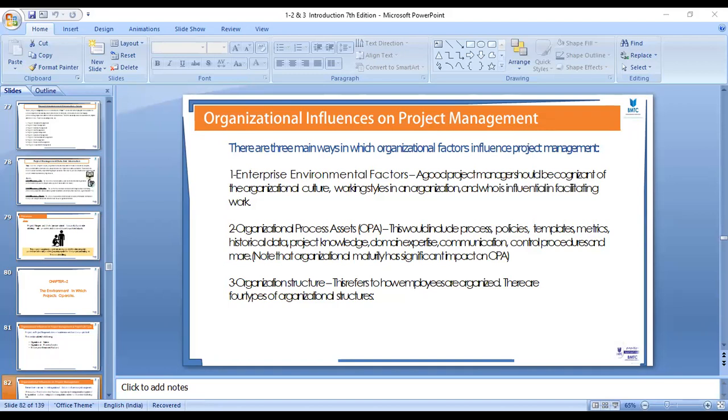Then we went into the various factors. One of the important factors is the structure of the organization where you work. We went through various kinds of organization structure, starting from the organic type, then moving to the functional type. How many structures can you see in the matrix type? Four. One is the weak matrix, the second is the balanced matrix, the third is the strong matrix, and the combination of all these is called a composite matrix.